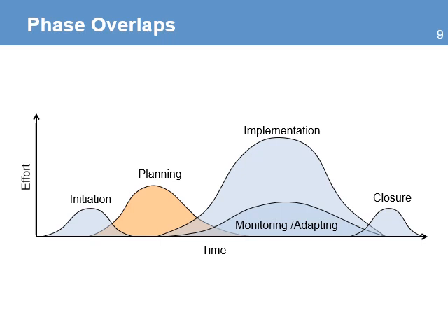This is an important phase, and sometimes project managers don't place too much attention and effort to develop all the plans into the required level of detail and try to implement the project right away. There are many risks in doing that. One of them is that you might find out during implementation that many of the plans you develop in a rush are lacking details, which can cause delays and quality problems.